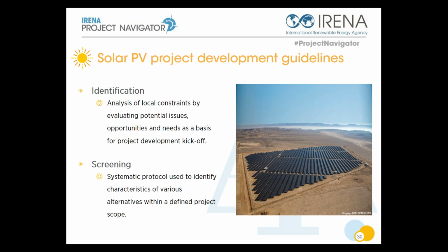Here it's very important to identify any potential showstoppers. For example, for solar PV, if you have identified land and you intend to sign a land lease agreement, so basically rent the land for a given period, you need to make sure that the landowner will not change his mind along the way of the project development. So essentially, provide a pre-agreement that sets suitable terms and conditions for the landowner and the project developer.